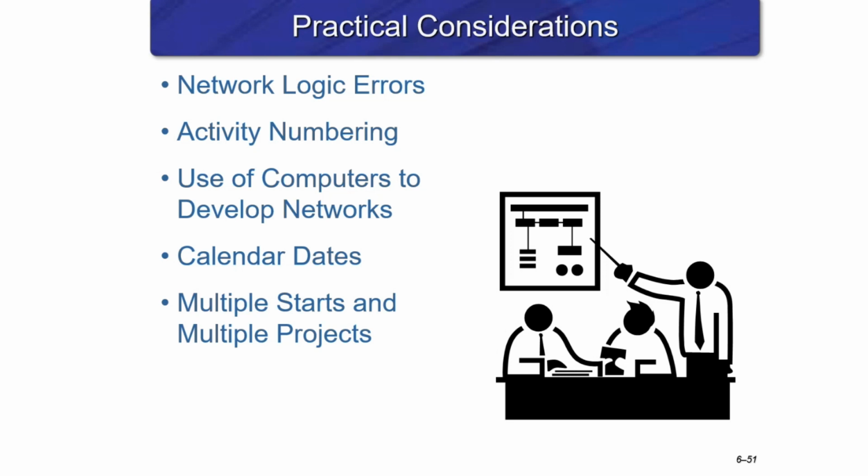Okay, and sometimes in theory projects are connected to certain things, but in practical things they might not be well connected. So for example, if you are building a house, you want to lay carpet, then you have to finish putting the floorboard first.